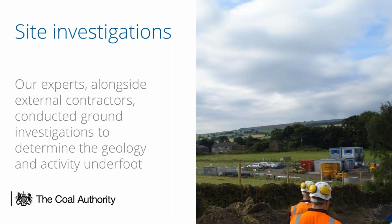We then did some site investigations, as we mentioned a bit earlier. Boreholes had been carried out previously, so we didn't need as much trial pitting, which again was to confirm the outcrop. There's also a sandstone band, which we found at the bottom. That outcropped, and that turned into a bit of an opportunity, because we were able to crush the stone on site and use it for the roads, which saves us importing and getting rid of the sandstone. The site was also very wet, so there's quite a bit of work up front to manage the water.